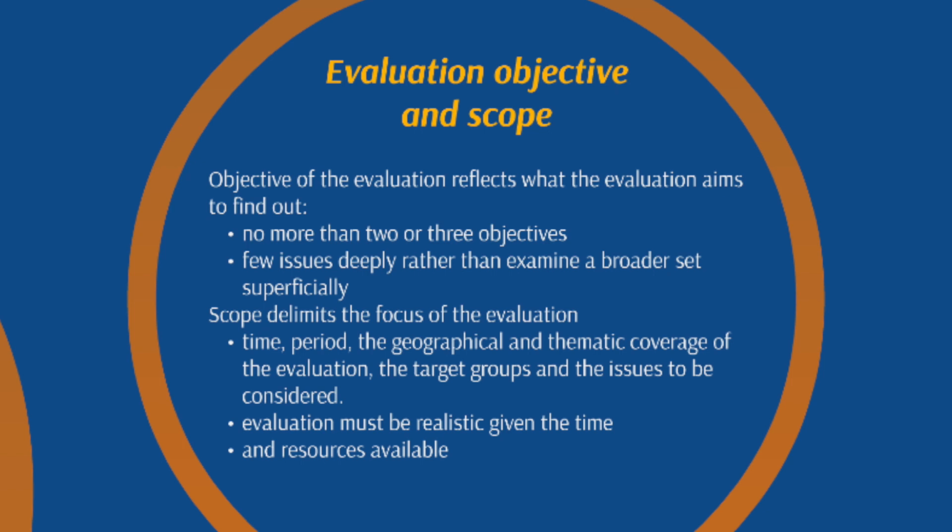The scope limitation is very important. You explain which period you are talking about, which sectors, which activities, which priority axes you want to evaluate. Because if you leave the scope open, basically you will not get anything. So it's very important to limit, and very, very important to have this evaluability question in your head.